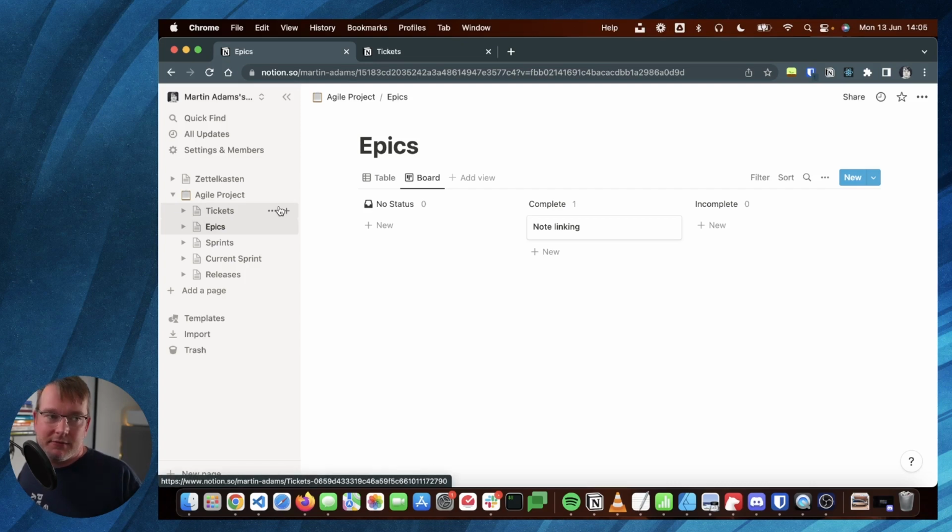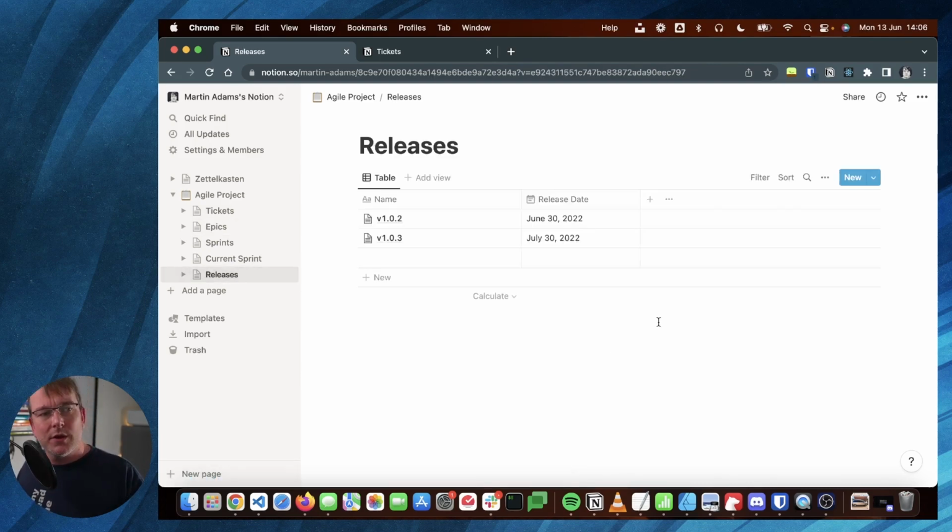We could take this even further, where we could look at the tickets, look at the sprint dates, so you roll that up through the ticket to the sprint date, and then calculate the maximum date of those tickets, so you can look at when your epics are scheduled to be released, and then you can communicate that if you need to. So I'm going to try this out with Flowtelic, and that's the note-taking app that I am building,